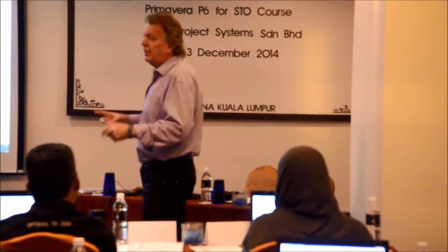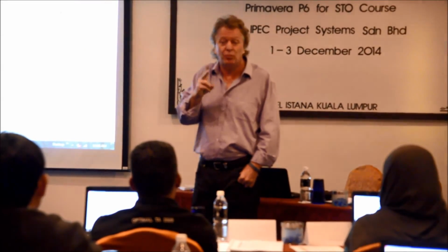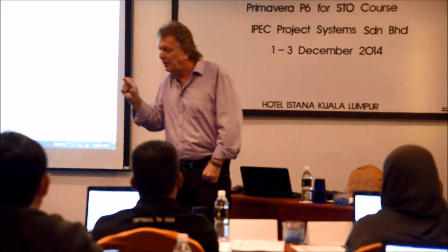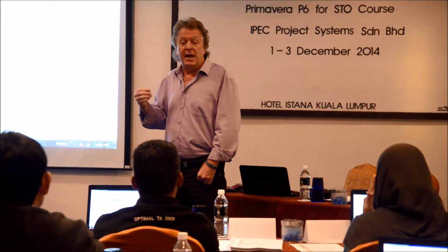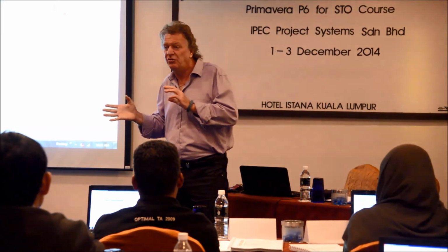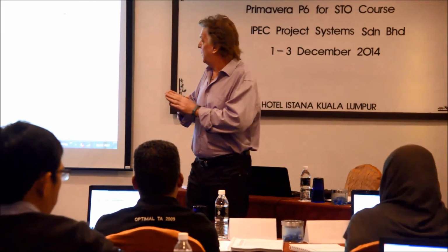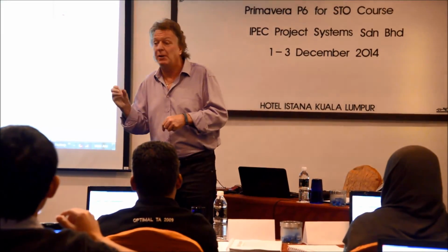Planning and estimating are two different things. There's only two steps to planning. It's really easy. One is the activity, and the other is the logic. That's it. That's planning. And it's a logical thing to do. It doesn't take any imagination. Then estimating is how long will it take, how much material do I need, how many people do I need.